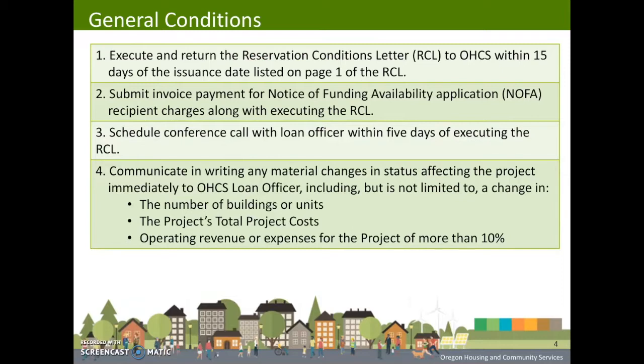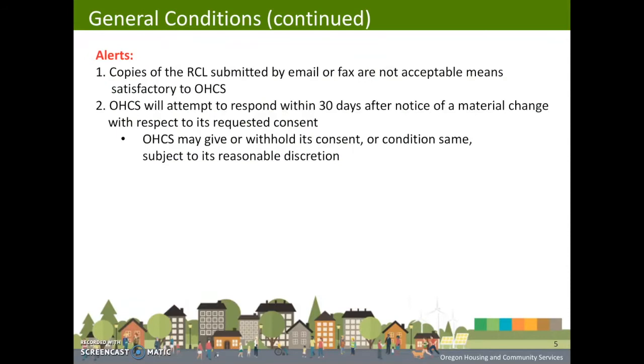Here are a few examples of material changes. If your project changes the number of buildings or units, or there is a change in the project's total cost, or if the operating revenue or expenses for the project change more than 10%. Please keep in mind that OHCS does not consider emailed or faxed copies of the reservation conditions letter as valid submissions. We require an original penned signature returned to the department. Also, OHCS will attempt to respond within 30 days of any material change notice given to the department.